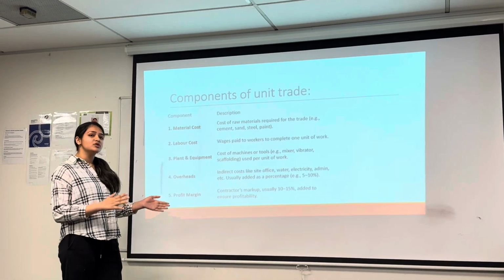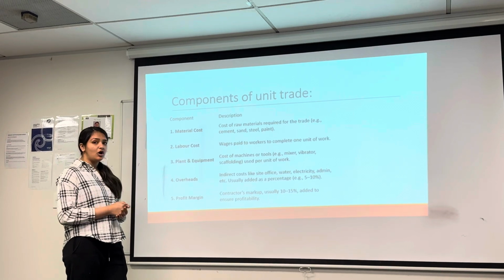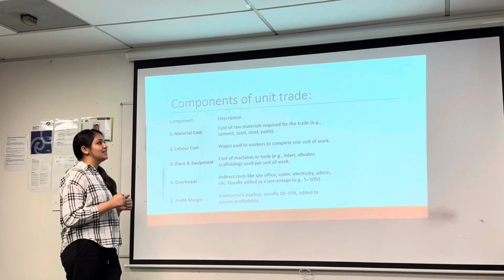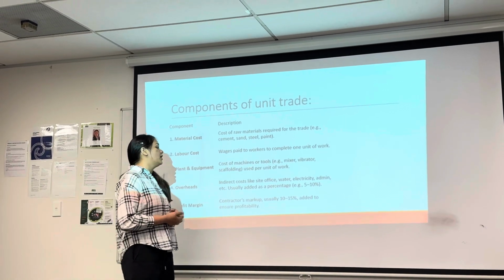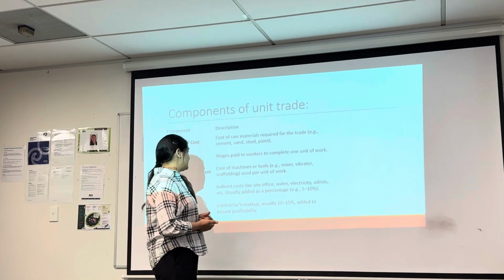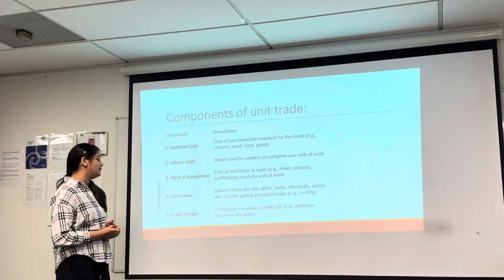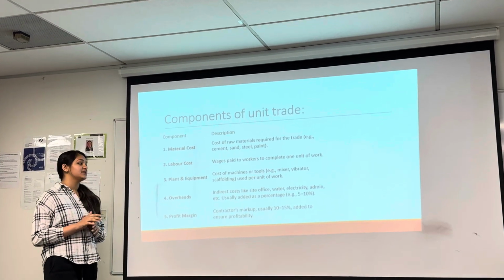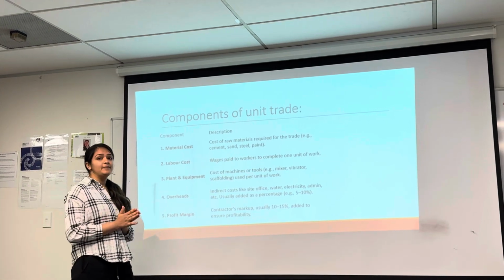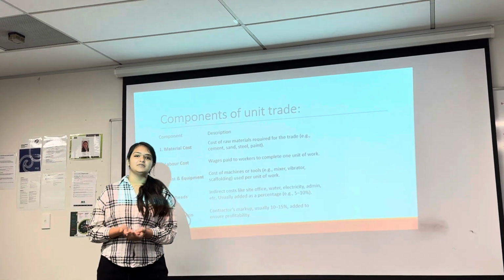Overhead costs are indirect costs which are not included directly in our project and may arise later, maybe office bills, water, electricity, admin, extra. And the profit margin is the margin which we keep extra from our project, from 10 to 15%.